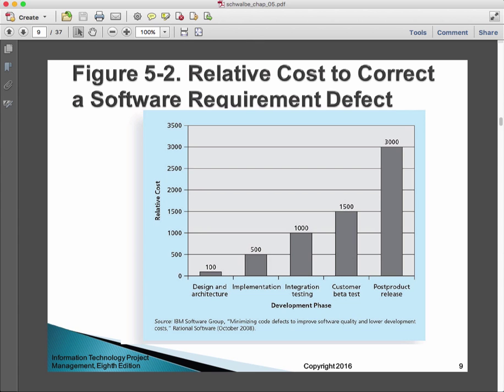So the idea of this is you need to be open to hearing about potential changes to your current understanding of the requirements. You need to be open to that all along, because if you're resistant, you may just take a change that you're going to accept anyway and put it off long enough that it's pretty expensive to incorporate it into the project.